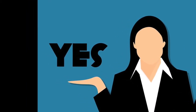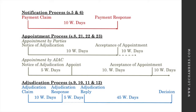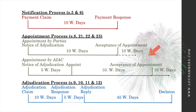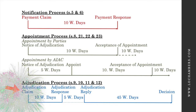Within 10 working days of the adjudicator's acceptance of appointment, the claimant can then file an adjudication claim. The respondent will then have 10 working days to file an adjudication response, and the claimant will have 5 working days to file an adjudication reply thereafter.